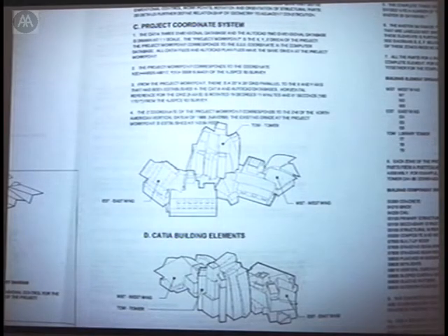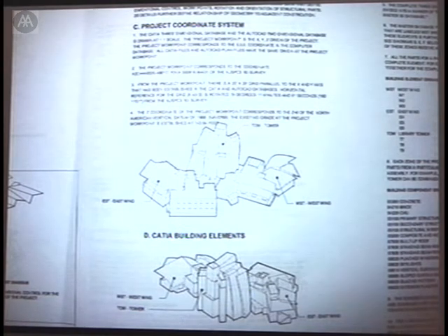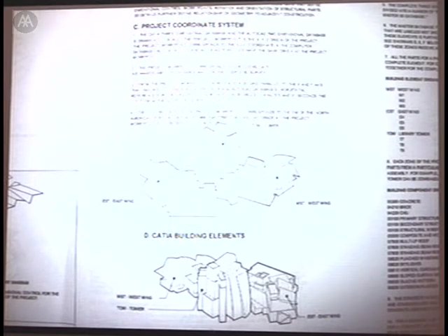If you look at a contractual document like that, it looks something like this. This is part of it. Basically, it is a descriptor of the information, of how it is aggregated, right down to the very point of where it is located in space. So I'm going to say, contractually, the GPS coordinates of the origin of our site are in a particular location. Thou shalt use GPS of this tolerance. When thou shalt look at this model, thou shalt use version so-and-so, service pack so-and-so.